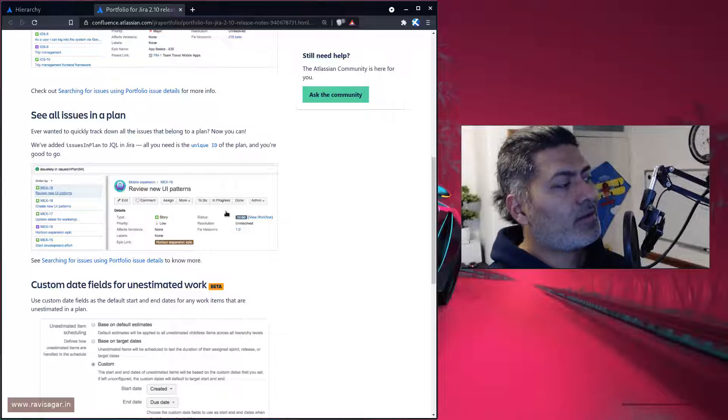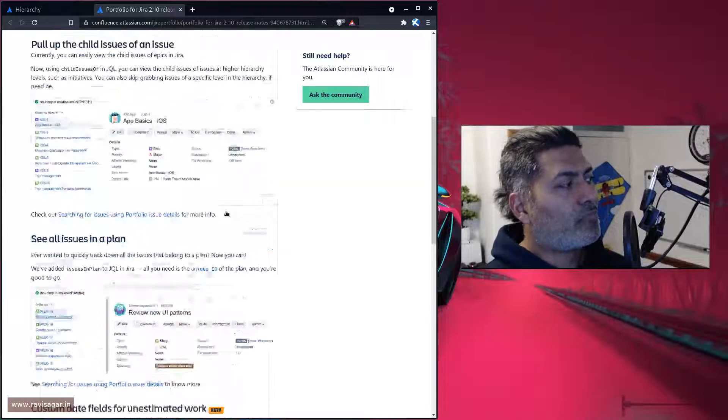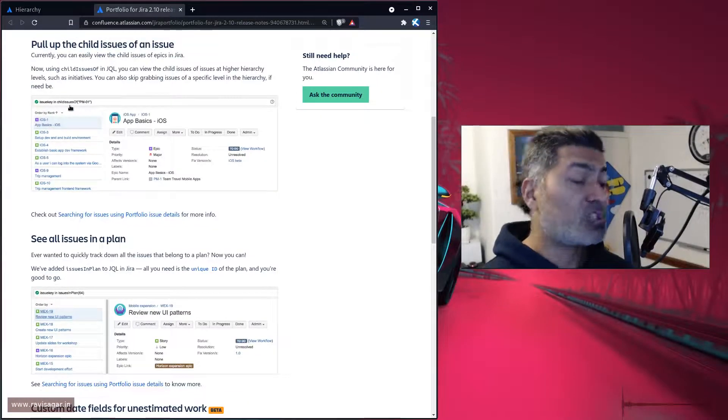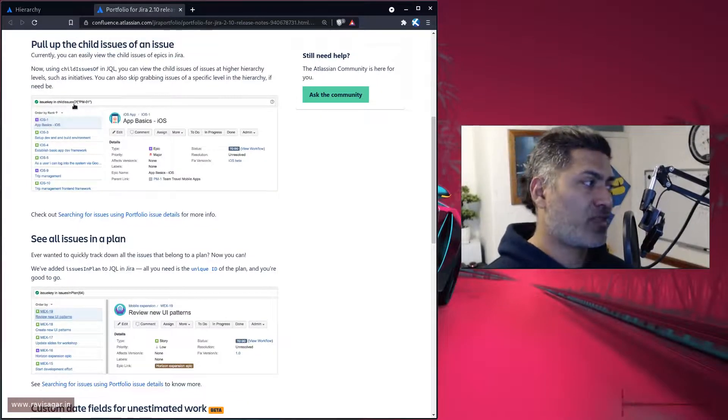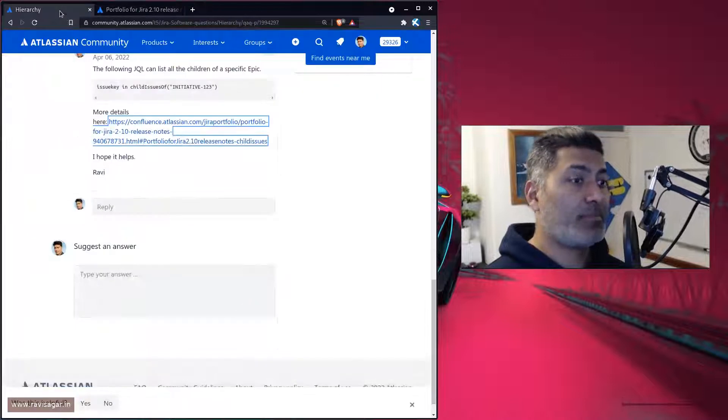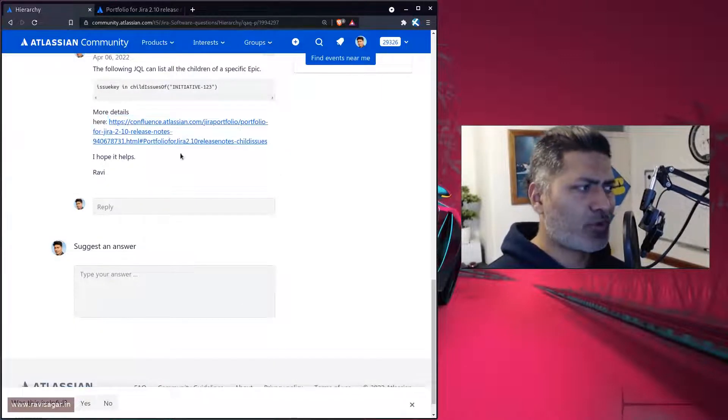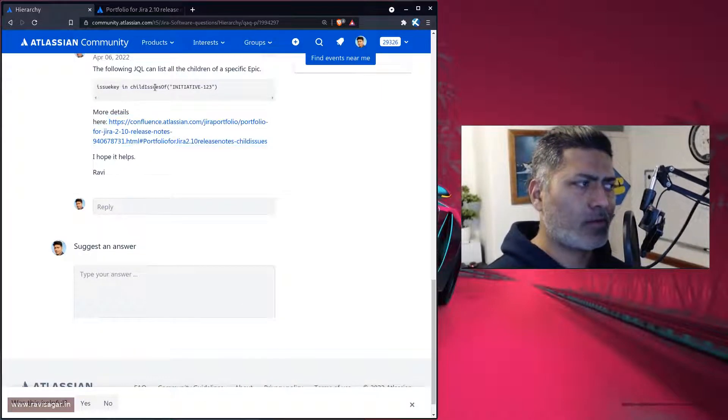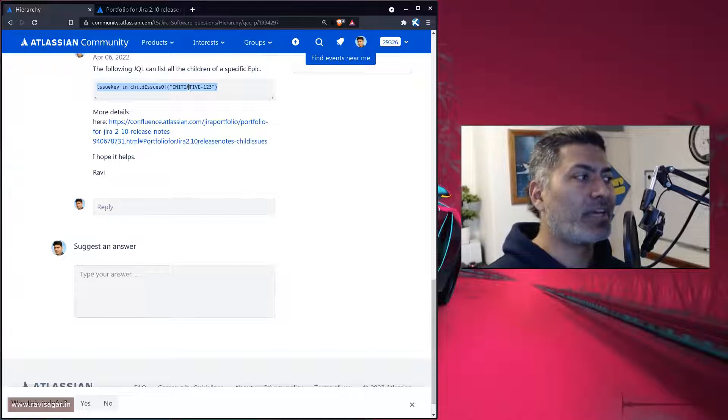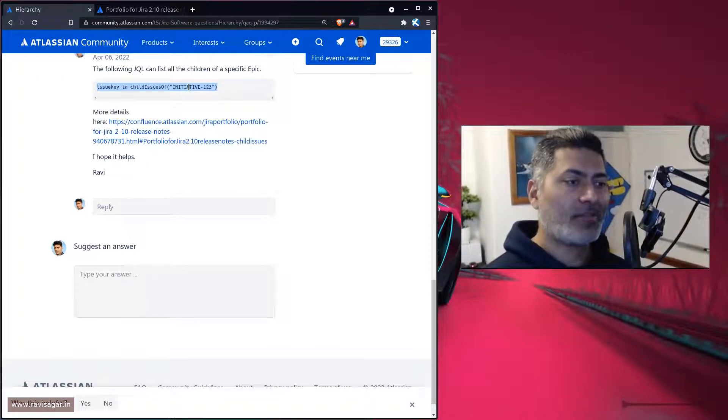For example, for finding all the child issues of a specific initiative, like all the levels, you can use something similar to this. Basically, you have to hard code your initiative. So maybe create quick filters based on this.